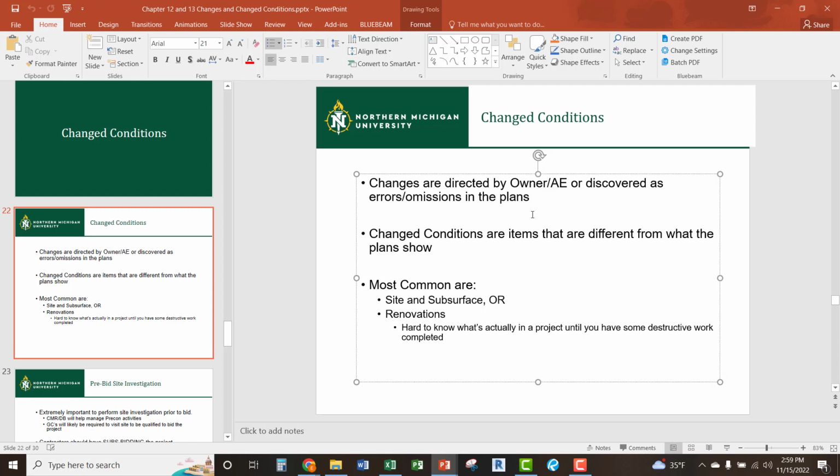They've been approved for that amount of dollars for that 20 million bucks, including the contingency dollars. What they would rather do from an owner side is utilize the money that they've already had approved so they can spend down all of it, which makes sense to them, instead of going for change orders and having to increase their limits.